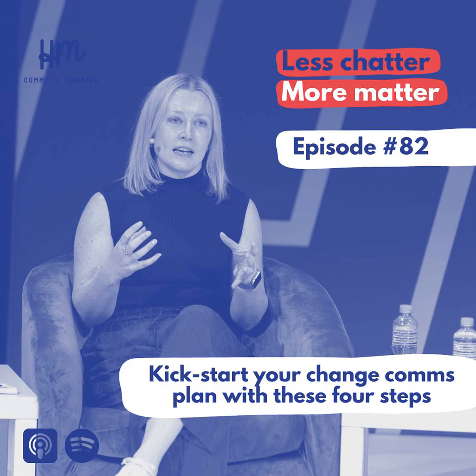Now, why is that? Because taking a secondhand brief is a very poor idea. I should know, I've had this backfire on me before, where the person I took the brief from wasn't actually aligned with the sponsor of the project. And it turned out that all the work we'd done, everything we'd developed, wasn't what they wanted at all. So it just results in the client thinking you're incompetent and a whole lot of rework.